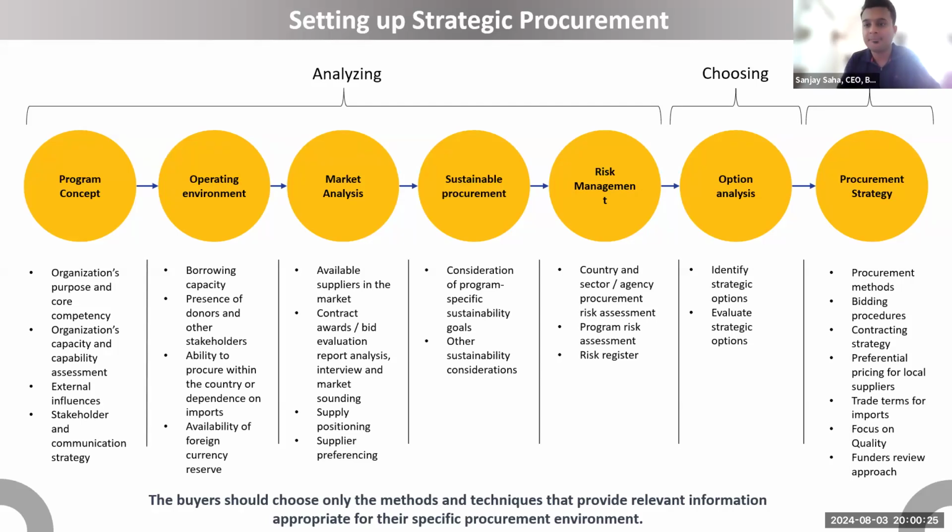Okay, good afternoon. My question is, what's the minimum time frame for strategic procurement? What's the minimum time to plan for strategic procurement? Minimum time frame you can calculate by understanding, first of all, how much time it takes for your supplies to arrive in the country as soon as they're ready at the manufacturer side. So say if you are getting them by sea route, say from India, majority, it might take 3 months, it might take a bit less. That's number one.